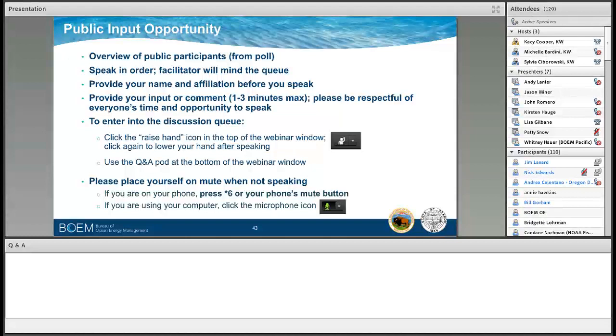BOEM and the state could create very large call areas that can then be reduced before the wind energy areas that are subject to the auctions would be published. By having the call areas published sooner, it will start a process that will shorten the time that we have to wait before we get to auction, but will not eliminate all the considerations for the stakeholder groups.